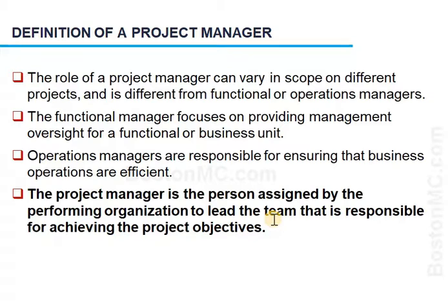In an ideal world, the PM should not really be taking on engineering or other tasks, because that makes them biased in a way. They will be more focused on getting their technical work done, and if mistakes were to happen, they are less likely to report those because that conflicts with their image.